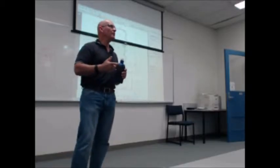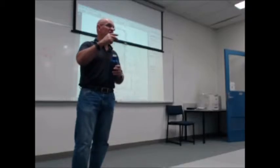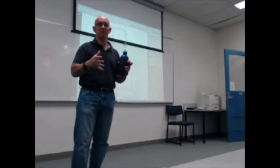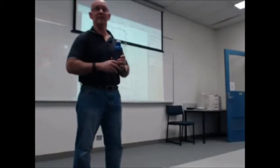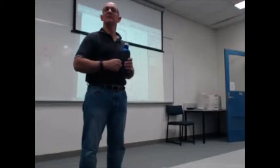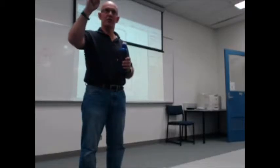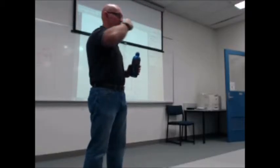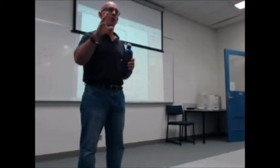Anyhow, his missus has gone out, and she's picked a nice square 200x200 white tile. And he's bragging about it. Come in, we're under what you've allowed. Oh, fine, great. Until I went down to order them and they wanted to know how many linear meters of border tile I wanted. She's getting three border tiles. One, two, three, around everything. Oh no. The border tiles cost more than the wall and floor tiles.